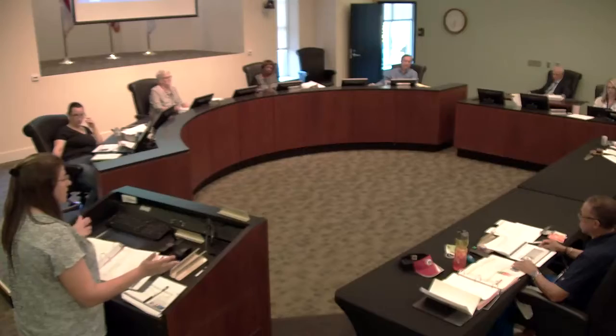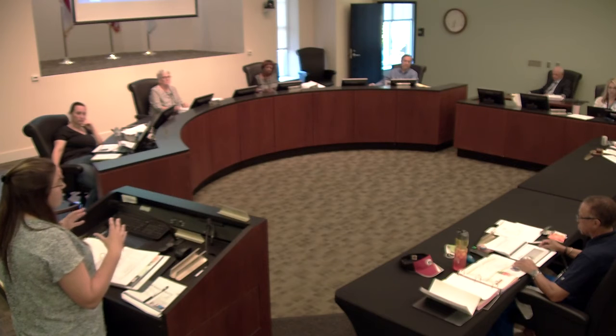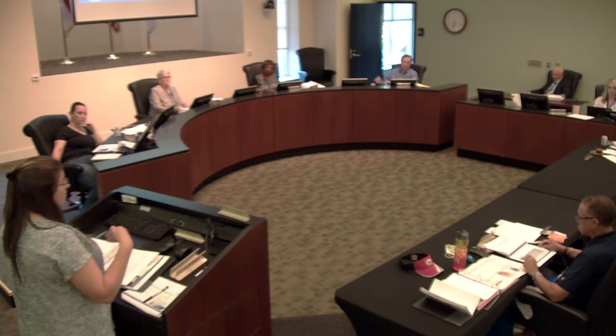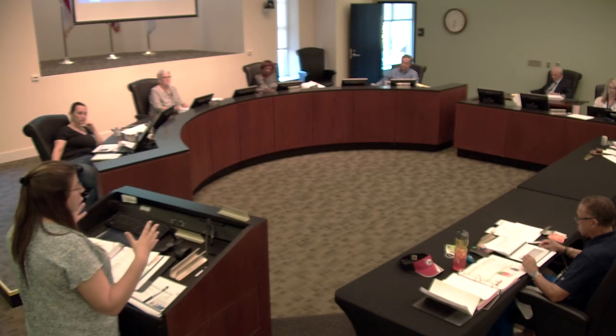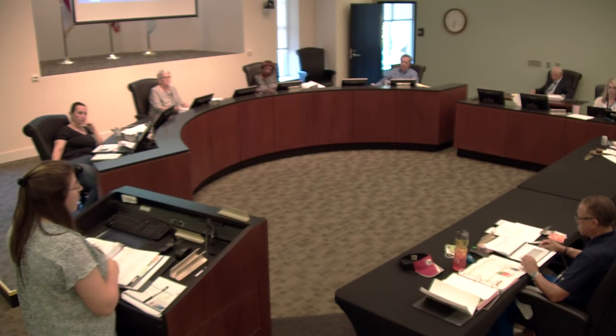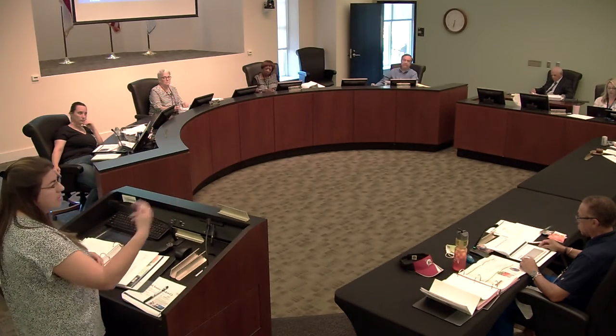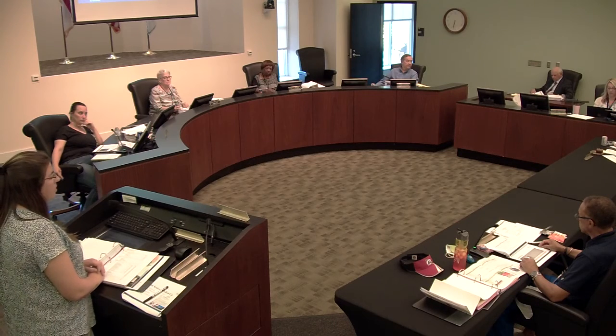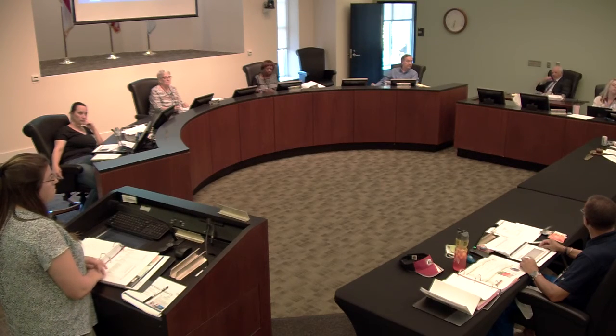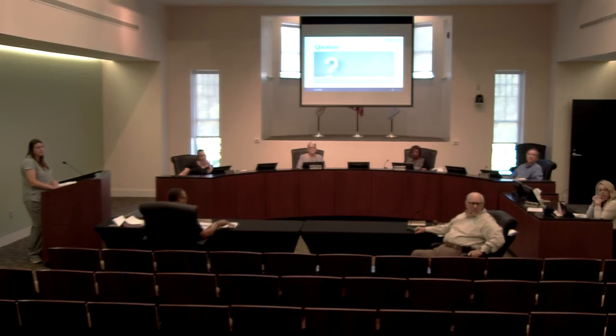So do you have to have that if you paint crosswalks, or do you have to have it if you stamp crosswalks? It's my understanding, Chris, you could help me out, that if we're doing anything within the encroachment area of NCDOT's road, we're going to have engineer drawings. And Chris, yeah, he's nodded that we would have to have that. For any type of just painting? That just seems excessive.